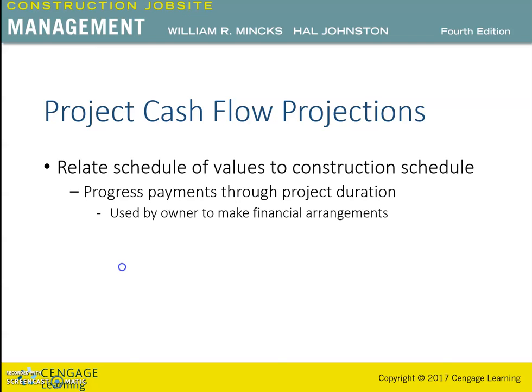So this projection is used by the owner to make financial arrangements, which creates available funds for the payments and optimizes investment opportunities. The contractor also can use the cash flow projection for anticipating revenue for future periods.